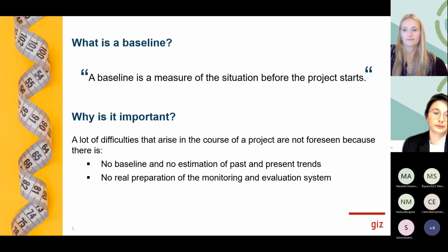Yeah, what is the baseline? The baseline value is basically the starting point of your project. It shows the current situation before your project comes in and intervenes. A baseline can be 0, but many times it's actually not 0. So please make sure you identify a valid baseline for each indicator. A baseline is used to measure change and also to monitor the progress. All indicators must have a baseline before the start of the project.